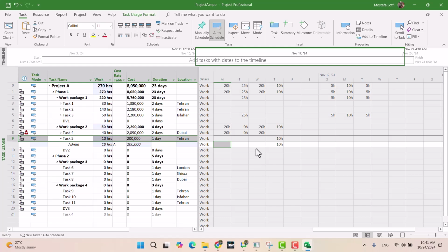3 days, and also it means one admin is required, but you don't necessarily have one specific person that needs to work 72 hours, right? You can have multiple resources working together, replacing each other, but on the project you have 3 days non-stop, 72 hours of work, that the admin type of resource should cover. We need to look at it in this way. Of course, one person cannot do that. Maybe in some very exceptional cases.